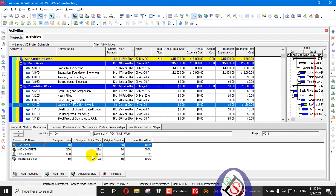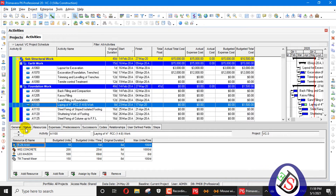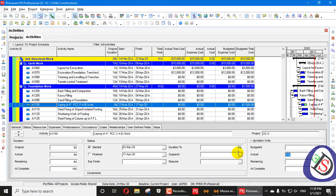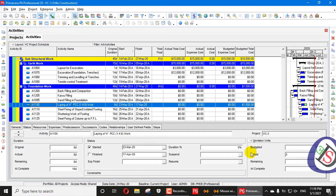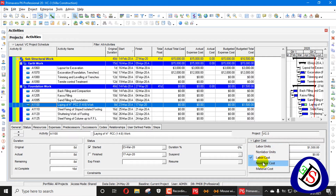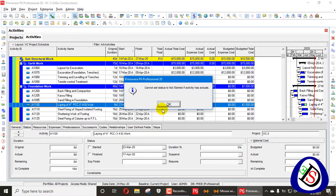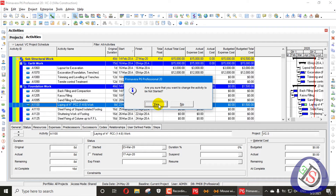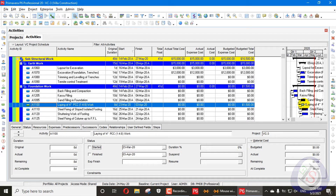For example, there are four types of resources. You have to change all the resources and remove all the actuals. You go into status — labor, non-labor — and set non-labor to zero, then change the material cost and all other costs to zero as well. You then set the activity status back to not started. This is a very long process and very tedious if you have a thousand activities.